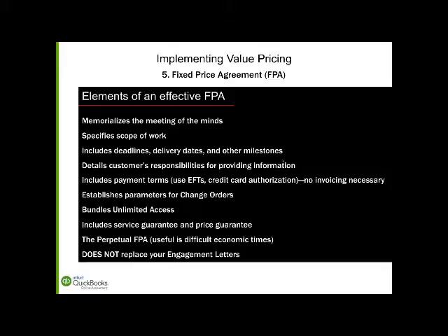And then the other thing the FPA, which is a fixed price agreement, does is include deadlines, possibly delivery dates or other milestones. It obviously is going to detail, if required, the customer's responsibility. It's going to include payment terms, whether that's credit card authorizations or electronic fund transfer or other types of things. This is why firms that value price don't have to invoice, because the payment terms are set up somehow automatically, credit card, whatever. It establishes parameters for change orders, so we'll talk about that.